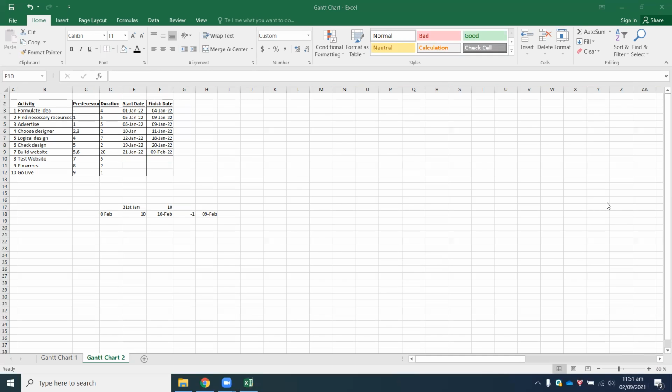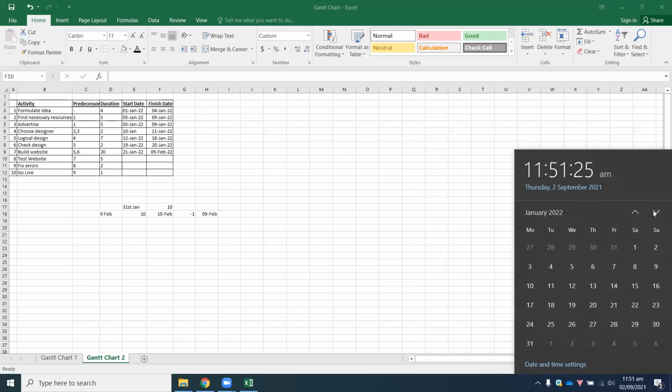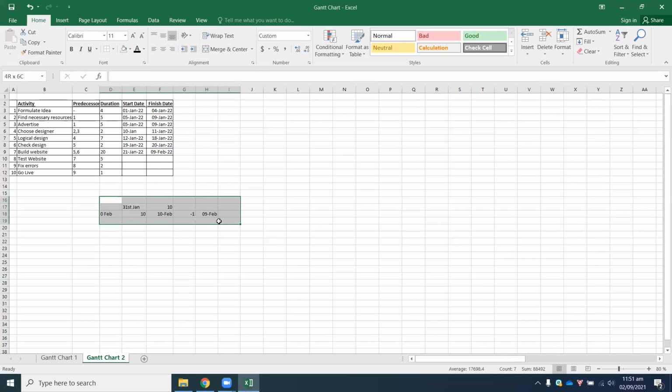Right, so you go to the 1st of Jan. So this is where you were on the 21st. So this is 1, 2, 3, 4, 5, 6, 7, 8, 9, 10 days, 11, 12, 13, 14, 15, 16, 17, 18, 19, 20. So the 20th day finishes on the 9th of Feb. That means this is correct. Now, if you are not able to figure it out by the calculation that I did earlier, you can always go and manually check in the calendar.